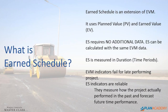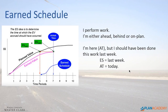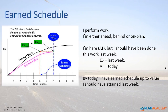So how do we calculate Earned Schedule and what is the main idea behind it? Let's look at this graph. I'll try to give you a word reasoning approach — if we could talk about what Earned Schedule is in words, how would you describe it? Well, like Earned Value, we always say: I earned this much, but I should have earned this much — I earned either more or less than I should have. Earned Schedule is almost the same thing, but it's in terms of duration. I'm performing my work and I'm either ahead, behind, or exactly on plan.